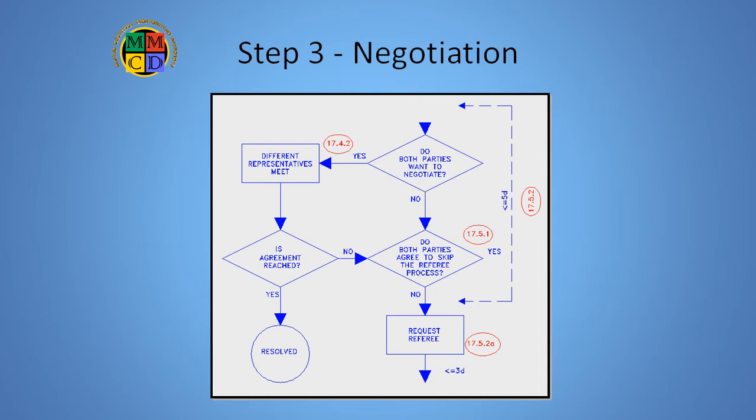For the reasons I discussed earlier, we encourage the two parties to provide different people to do the negotiating, such as the contractor's estimator and the owner's project manager. This step is the earliest, simplest, and least costly method of resolving the dispute.